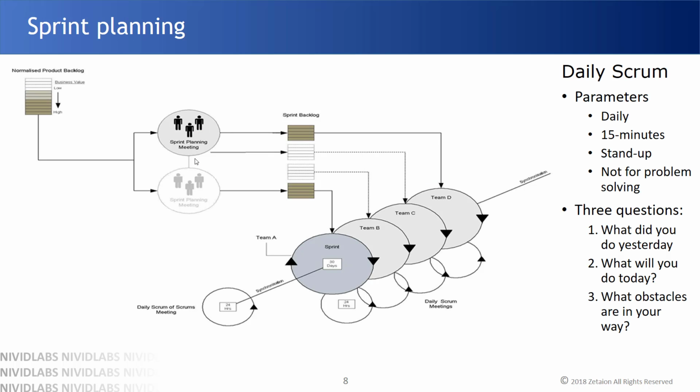When we come to our planning, we know our roles, what kind of roles are there. After deciding all the roles, when we start a sprint, like the first sprint in a Scrum process, all the product backlogs are taken based on priority, and between the members it will be decided what priorities will be assigned to what sprint. And if the team is bigger, each team will be divided into 5 to 10 members. So here, the diagram shows A, B, C, D, there are 4 teams, and all synchronization will happen in daily Scrum calls.